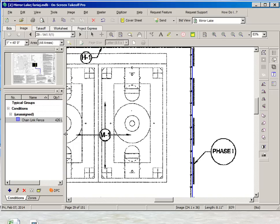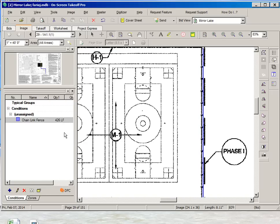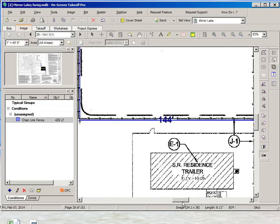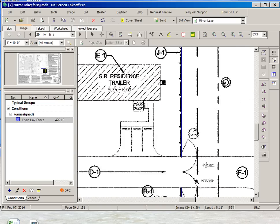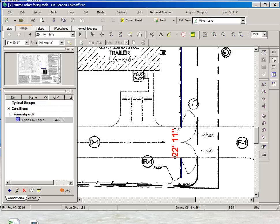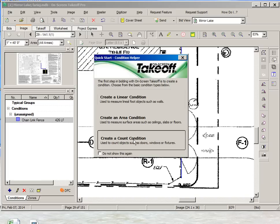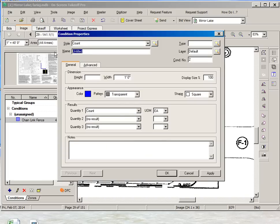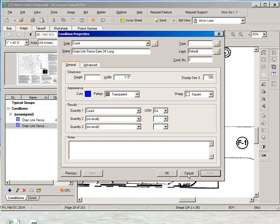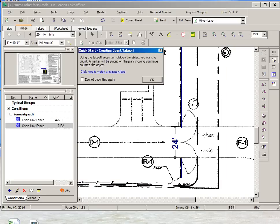We see that we have right now 426 linear feet of high chain link fence. We do have also a double gate, so we will probably want to measure the length of that gate. It seems to be 24 feet. So I could really create a new condition, count condition and say this will be a chain link fence gate 24 feet long. Right? And then we will have just one of those.